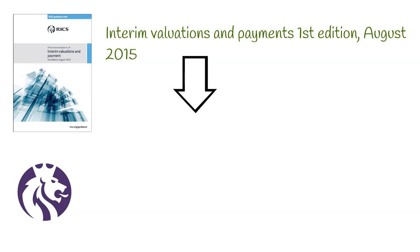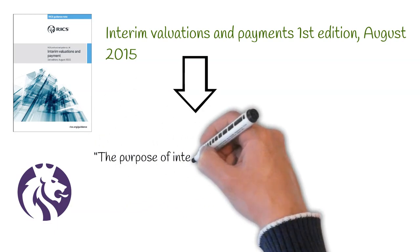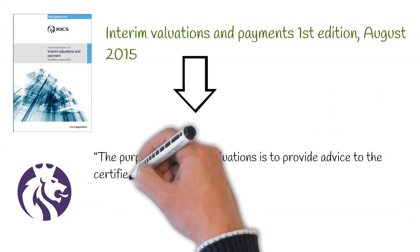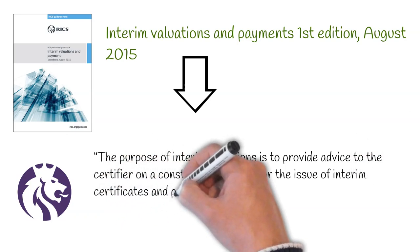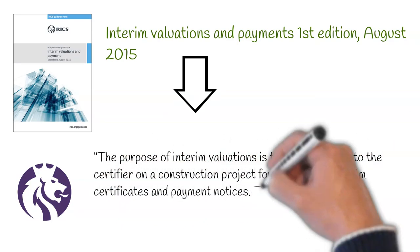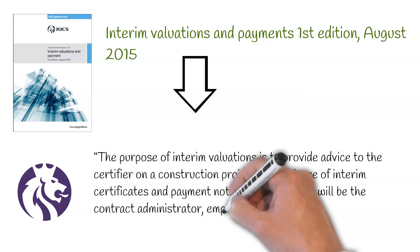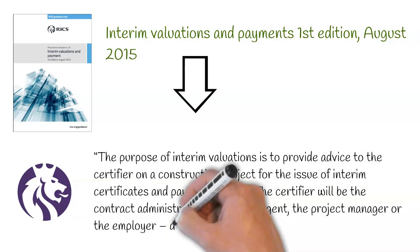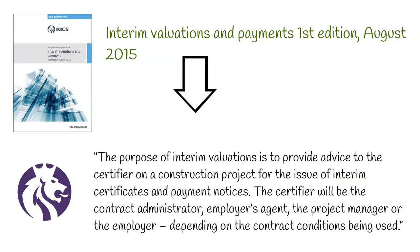The RICS states the following on the purpose of valuations: the purpose of interim valuations is to provide advice to the certifier on a construction project for the issue of interim certificates and payment notices. The certifier will be the contract administrator, employer's agent, project manager or the employer depending on the contract conditions being used.